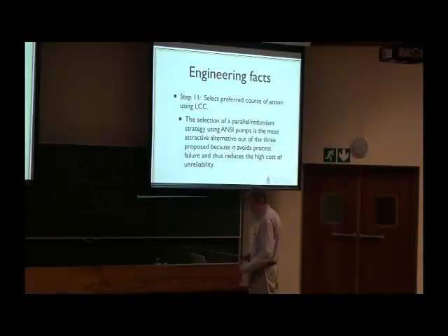Step 11, select the preferred course of action using life cycle cost. The selection of parallel or redundant strategy using ANSI pumps is the most attractive alternative out of the three proposed, because it avoids process failure and thus reduces the high cost of unreliability.